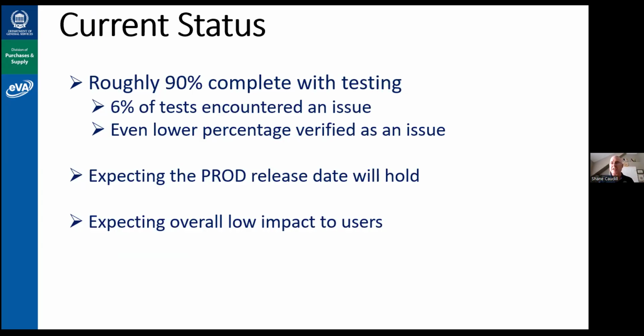About 6% of our tests encountered some sort of issue that we addressed and got a ticket in for. And an even lower percentage was verified as an issue. Maybe it was a data setup or a misunderstanding from one of our testers. So again, we're feeling very confident. Our plan is to be complete with our planned testing by the end of this week. We've got a very low incident rate of issues actually coming in.